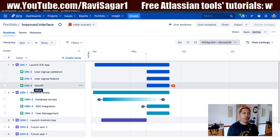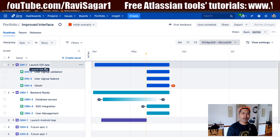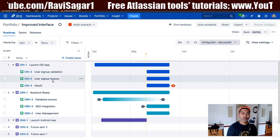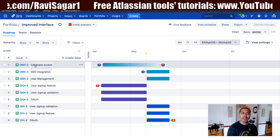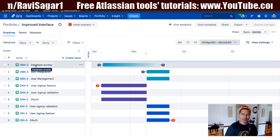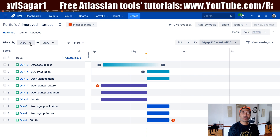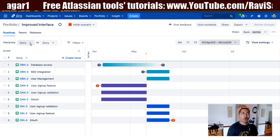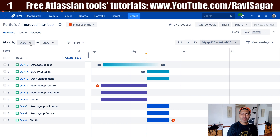So this is the situation right now: we have 'Launch iOS App' followed by 'Backend Ready'. If I look at 'Launch iOS App', I do have some stories like user signup and so on. Now, if I change it to story level, suddenly the stories are now in a different order. This is something really interesting, because if you're working with the improved interface, the ranking of the issues is not really driven by the hierarchy.